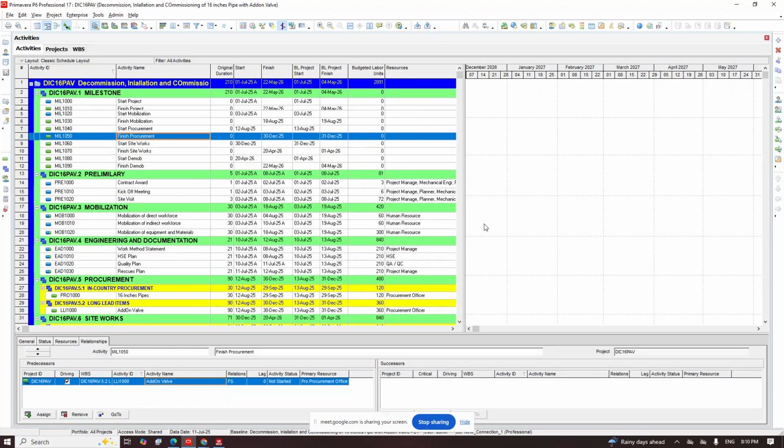These stages are just pretty simple. First, you should export your data to Excel, and that's the first thing we need to do. The second one, you should clean up your data, remove some unnecessary columns, change the data names and the table names, right? Then you put the appropriate rows that you want. Then the next one is you format your table, make it look beautiful. The fourth one, you plot your graph. The fifth one, you format the graph. That's all.